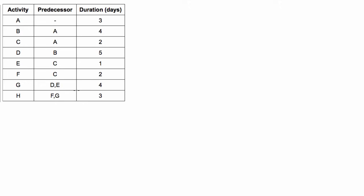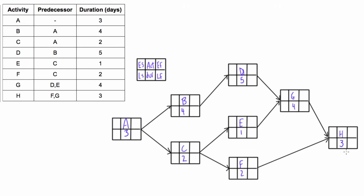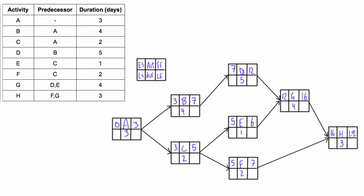By now, if you've been watching these tutorials, you already know how to draw the PDM network diagram for this, so let's go ahead and do that — it looks just like this. Then we can do the forward pass to find the early start and early finish of each activity, and the backward pass to find the late start and late finish. Now we can calculate the total float of each activity. We'll write that above each node, and I'll just write the value without the TF label.